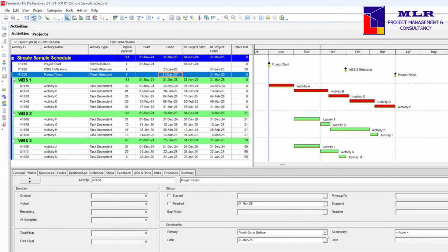Another way of setting the contractual project completion date is by the use of the must finish by property of the project schedule. Again, in a number of schedules that I have reviewed, the use of this schedule property is not being utilized and taken advantage of. If effectively used, it serves the same purpose as the constraint assigned on the project completion date. Let me demonstrate how it's done and the effect of it in the schedule.